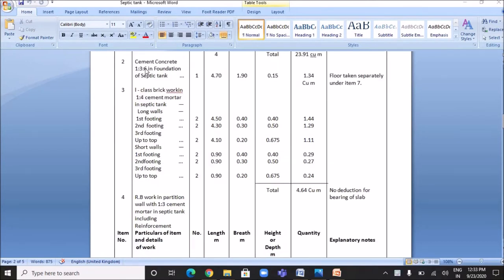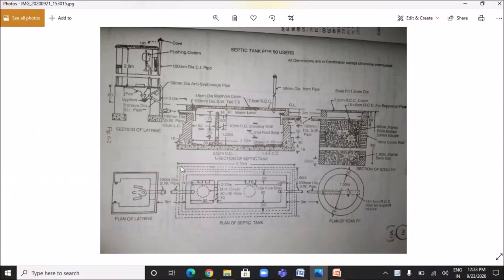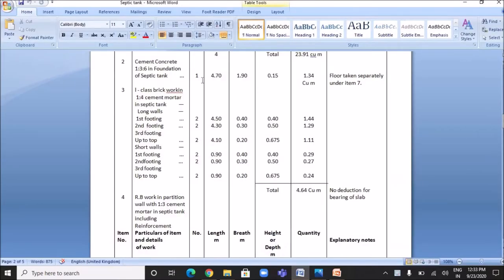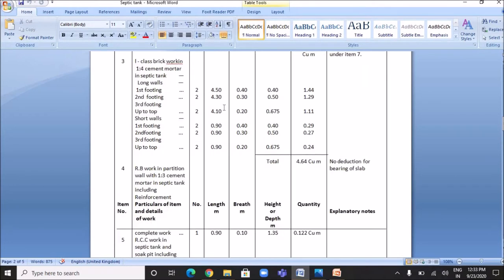The next item is cement concrete work in the foundation of the septic tank. The length is 4.7 meters, breadth is 1.9 meters, and height is 0.15 meters. The quantity is 1 × 4.7 × 1.9 × 0.15, which equals 1.34 cubic meters. The next item is first class brickwork in 1:4 cement mortar in the septic tank.